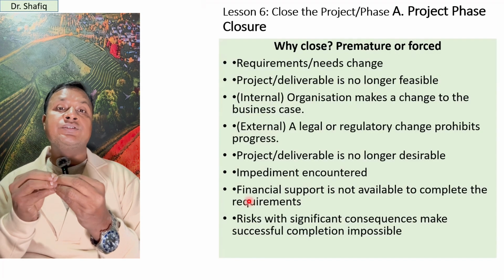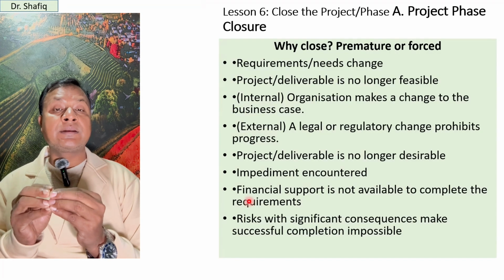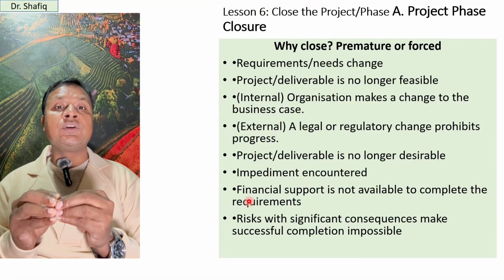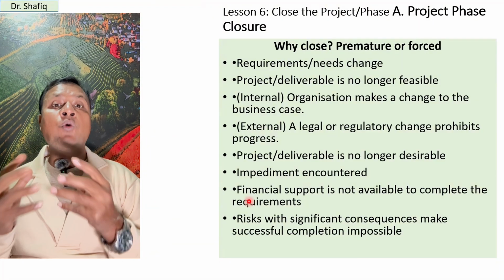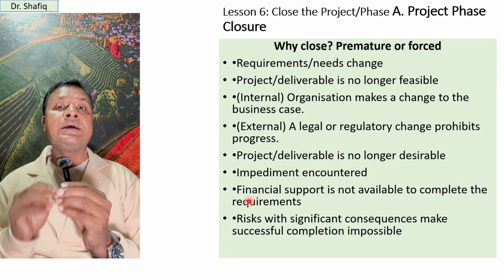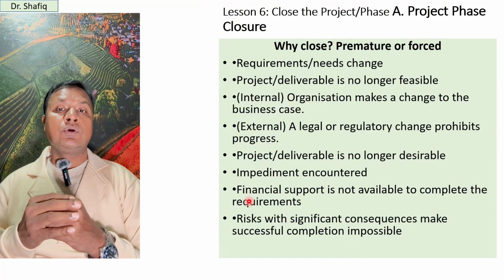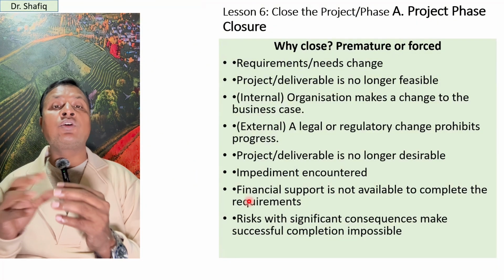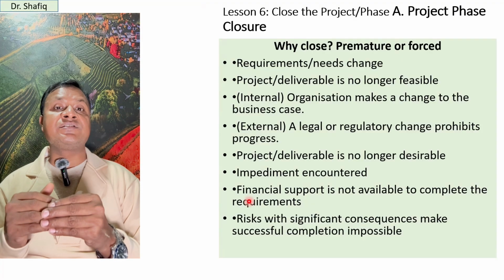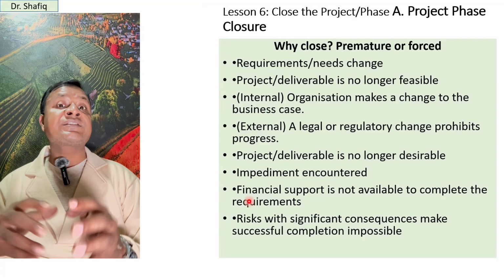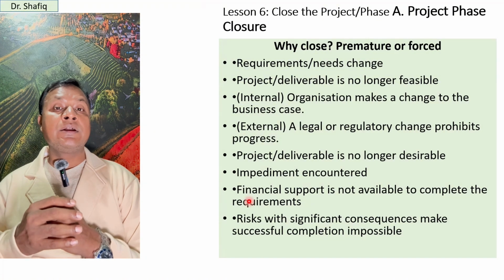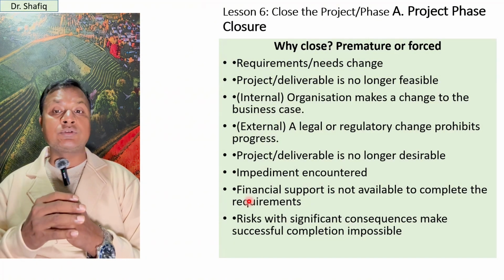So why close? Sometimes it occurs that the project is closed prematurely or forcefully. Why? Because sometimes the situation is such that requirements or needs change, or the project deliverables are no longer feasible, or the internal organization changes its decision, or external environment changes like legal changes occur, so that we cannot implement this project.